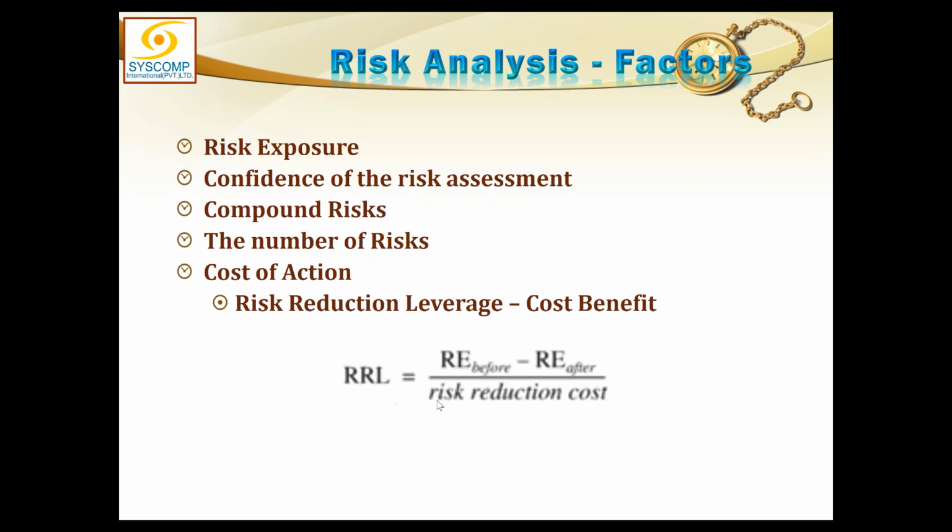So that is called risk exposure before taking any steps. Let's say that you have reduced the probability from 10 to 1%. So now it becomes how much? 10,000. So risk exposure before minus risk exposure after. That comes out to be 1 lakh minus 10,000, which is 90,000.